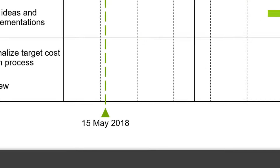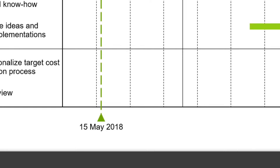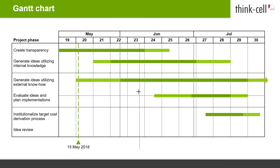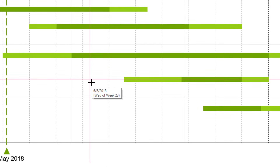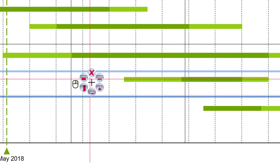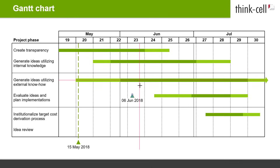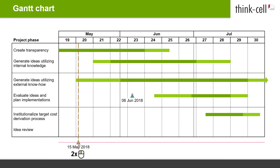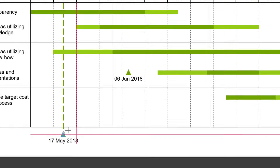Now that we are done with the activity bars, let's add milestones to your Gantt. Milestones mark singular events in your timeline chart. Hover your mouse over a row at the position you want to place the milestone — red crosshairs and a tooltip will help you find the exact date. Right-click and select New Milestone from the context menu. The milestone is inserted at the crosshair position. You can change the date of the milestone afterwards by double-clicking on it and picking the new date from the calendar, or by dragging it.